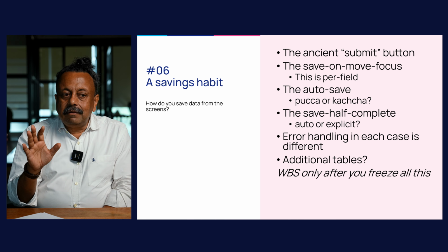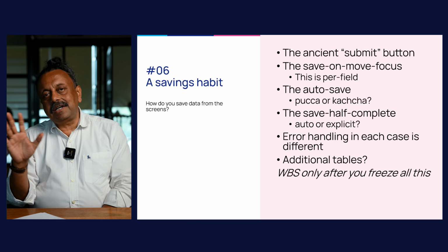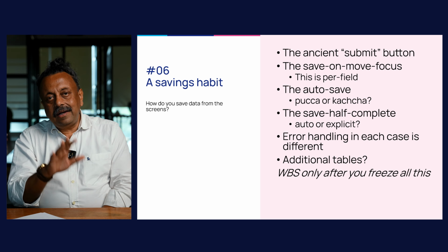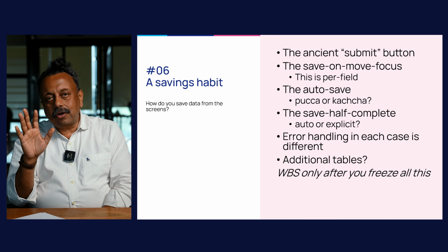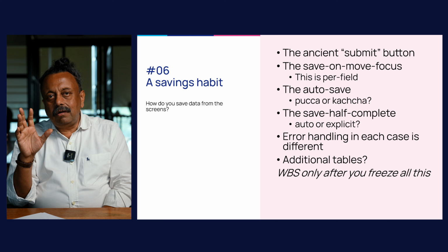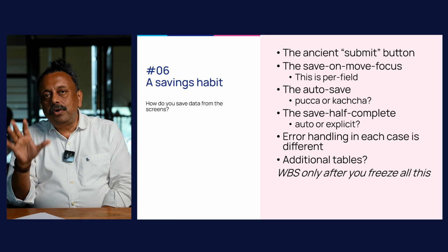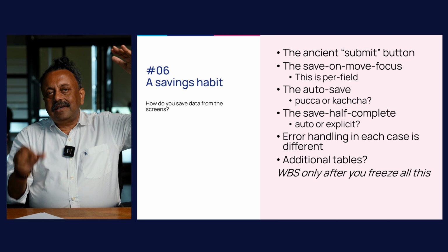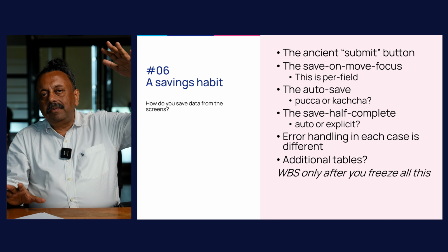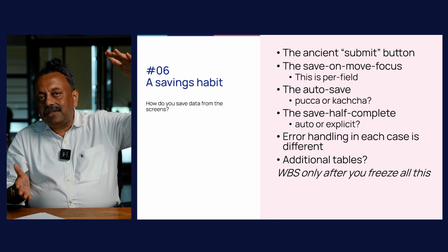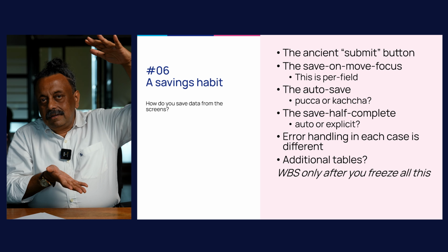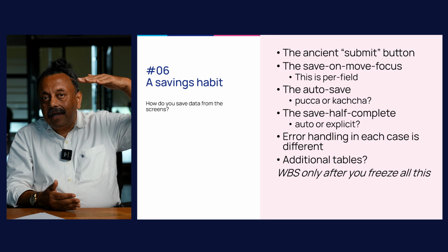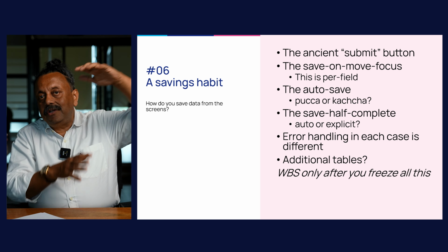And one of the important things to understand for project planning is that these things can increase your software complexity and overall function point count of the amount of effort required to develop the application. So a simple screen which just has that boring old submit button at the bottom right will be developed with much less effort than a more user-friendly screen which will have intermediate saves, it will have intermediate error checking and so on and so forth.